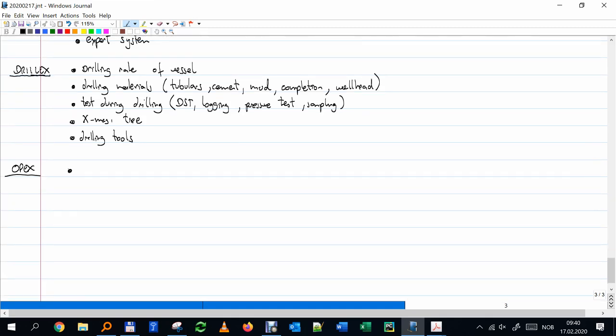But the OPEX is very important to define the abandonment rate. You always have to have enough production such that you pay for your operational expenditures. So basically the OPEX tells you for how long I will be able to produce. So I'm saying for the NPV it might not be that important, but it's important to estimate. Let's put that comment here.